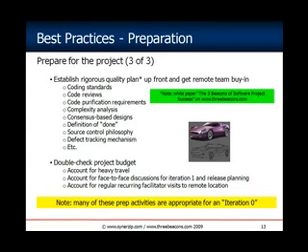You should develop the initial requirements. You should develop the initial release plan. You should set up TDD, CI, and the multi-site development environment. You should create a communication and synchronization plan. You should create a rigorous quality plan and verify that the budget has the additional cost included. So that's what I've got for preparing for the project.